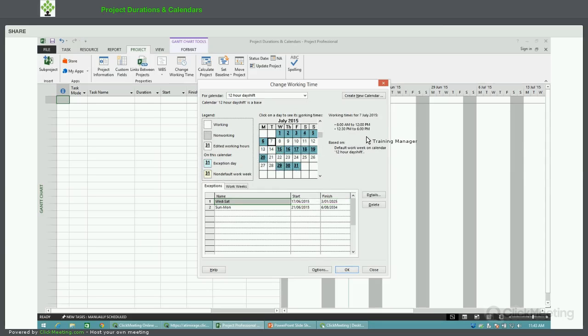Now, when I set up my initial options, I told it that it was working a 12-hour day. So if I say there's a 1-day duration, it means that there's 12 hours worth of work assigned to that duration. When I do that, my people are only working 11.5 hours in that day. So that means some of that task is going to be left over to the next day. Now I can fix that by mapping my 12-hour shift down to 11.5 hours, which is the actual work hours that these people are working.